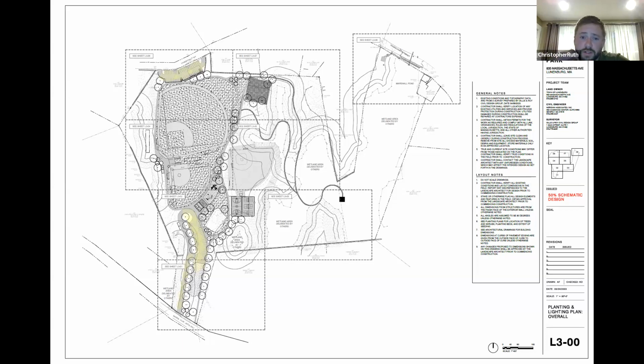I have yet to find a town that didn't have rules governing when lights could be on and off, so we'll have to check with the zoning department too to make sure we comply with their regulations. And I agree with what Chris just said, and Anna. I don't see much of a need or interest in lighting over on Highland. On Chestnut Street, I too worry about the neighbors where it's such a residential road. Okay, yep. And certainly be more interested in it over off of Mass Ave.